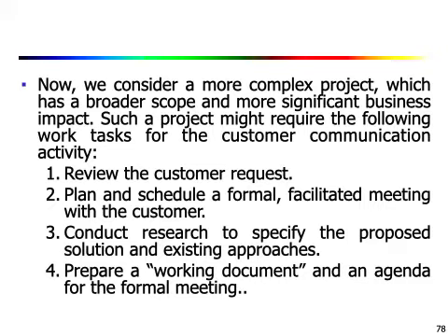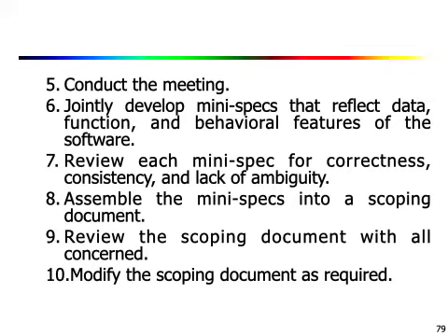tasks in the customer communication activity: review the customer request, plan and schedule a formal facilitated meeting with the customer, conduct research to specify the proposed solution and existing approaches, prepare a working document and an agenda for the formal meeting, conduct the meeting, jointly develop mini specs that reflect data, function and behavior features of the software, review each mini spec for correctness, consistency and lack of ambiguity, assemble the mini specs into a scoping document, review the scoping document with all concerned, modify the scoping document as required.